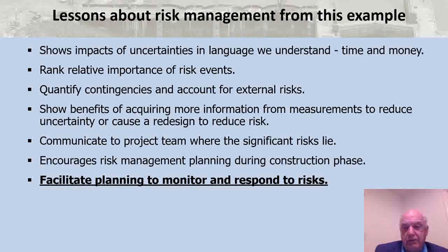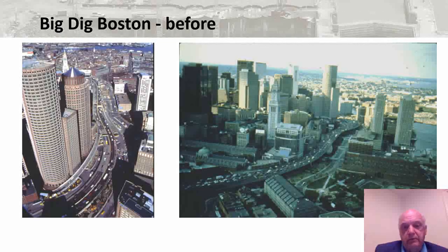So really this whole idea, if we expand the risk register out to include key risk indicators and limits on what is acceptable performance, it helps facilitate planning so we can monitor and respond to risks much more effectively. Another example,